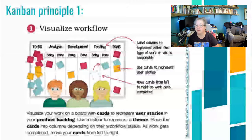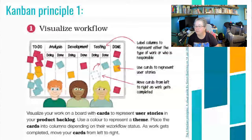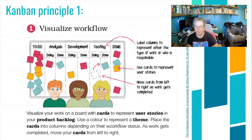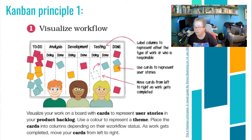So I want to review some of the Kanban principles within the digital workflow that Trello creates. Kanban principle one is to be able to visualize that workflow. These images I'm using are from a web guide called 'The Four Kanban Principles: A Visual Guide' by Simon Buehring from 2021. Basically, the Kanban system has a to-do section, an in-process section, and then done. And as you can see in this image — analysis, development, testing — it can get as complicated as you want.